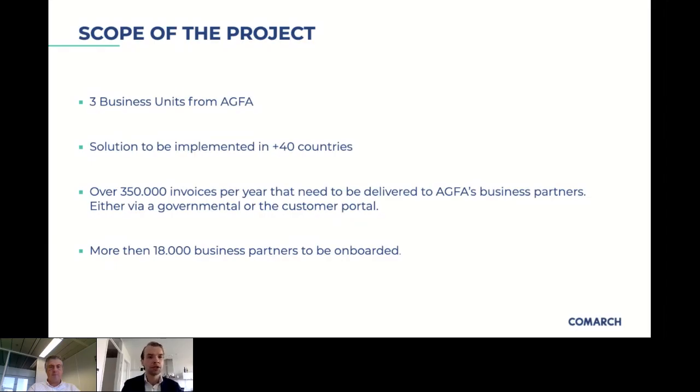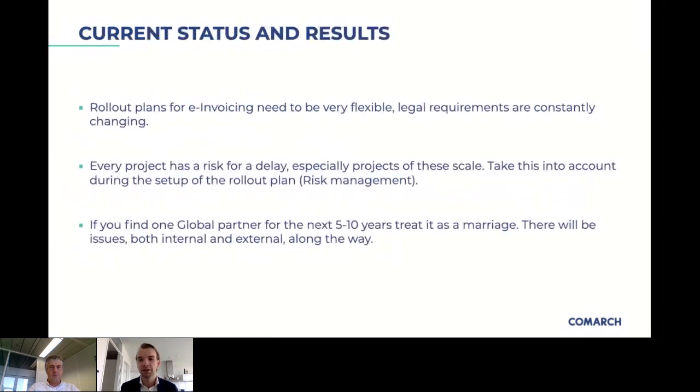Another point, which maybe you don't see that often, is that it could be internal resources. Especially in this big project, I'm glad to hear from Agfa's side, at least they set up a steering committee. They got everybody together, but sometimes people really underestimate a rollout plan for e-invoicing. They underestimate how many people need to be involved in this. It's people from IT, it's people from finance. And from that point of view, it could be quite difficult to have these internal resources.